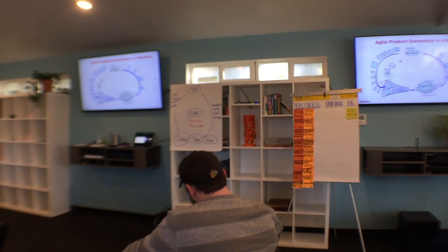The queue needs to be managed. Suppose stakeholders keep asking for 10 new stories every week, and the teams deliver 4 to 6 stories every week. That means the queue will just keep getting longer and longer, right? So before you know it, you have a 6-month-long wish list in the backlog and growing. That means that on average, every story that the team delivers is something that somebody asked for 6 months ago.